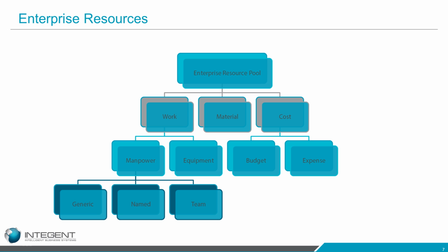Both of those, of course, use the Enterprise Resource Pool. The Enterprise Resource Pool is created by administrators, or possibly a resource manager. Typically, it's an administrator that does it. They enter resources into the Enterprise Resource Pool. They could be synced with Active Directory if you needed to. Otherwise, you can manually add them to the Enterprise Resource Pool if you're not using Active Directory, all right?